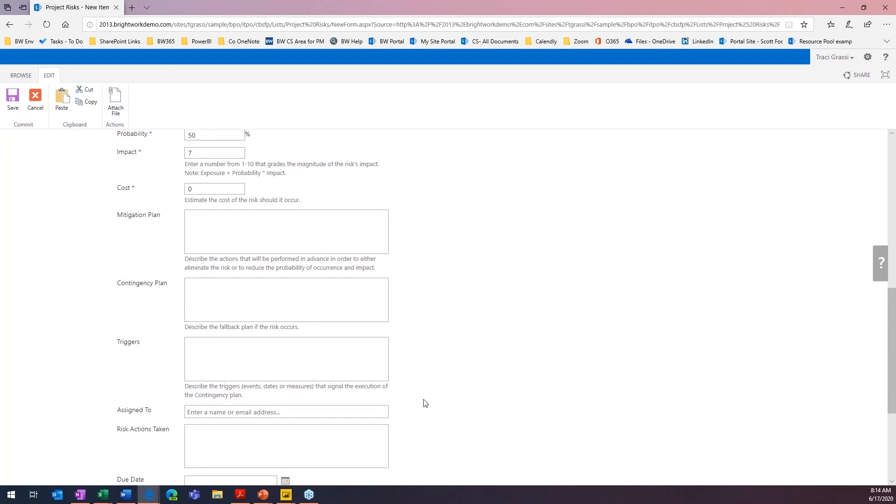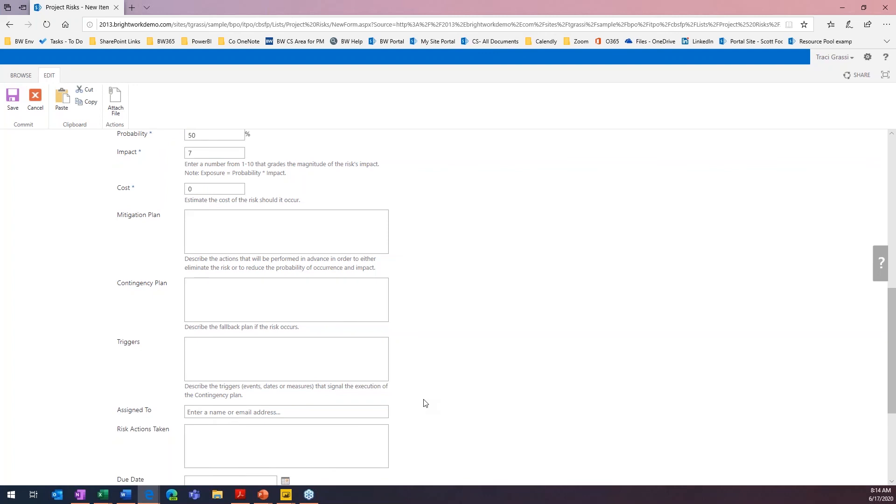And then we still have a couple fields here. Our mitigation plan. What are we going to do in order to eliminate the risk or to reduce the probability of the risk? We can put our mitigation plan in here. We can put our contingency plan. So, what's the fallback if this risk does occur in our contingency plan? And then, next one, what are some of the triggers? Maybe it's that person taking vacation, if they're allowed to take vacation. So, we need to pay attention to that very well.